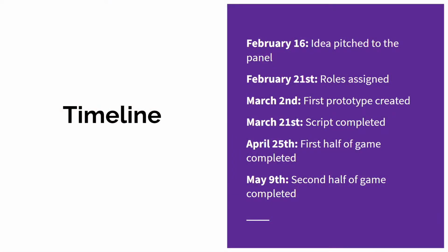We started this back in February. Our idea was pitched to the panel, it got chosen, and then the week after we started assigning roles and basically assigning everything that needed to be done. And in the first week of March, our first prototype was created in Unity, and it was a very bare bones prototype, and you'll see it soon. And we basically decided what we liked, what we didn't like. And then as time went on, I managed to complete the script for the game's story, March 21st.